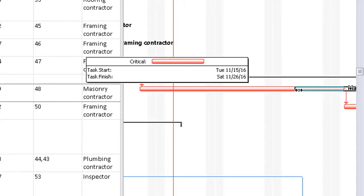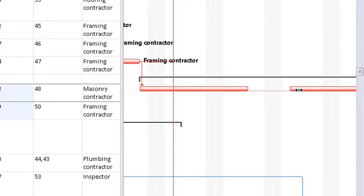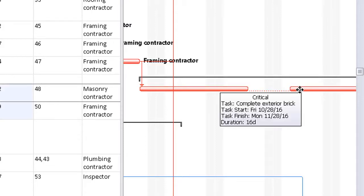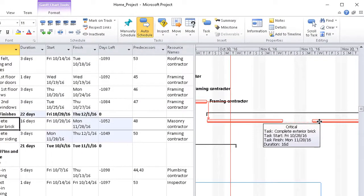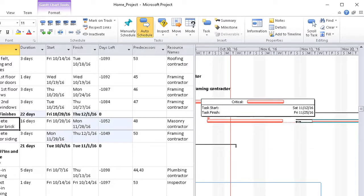We now have a multi-day split. If we make a mistake, we can always undo, as I've just done here, or simply drag the second piece of the bar back to the left to rejoin the first.